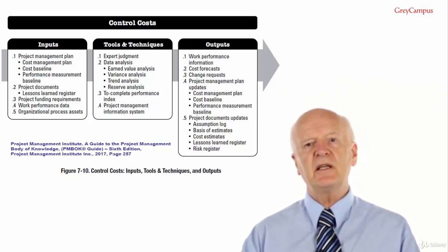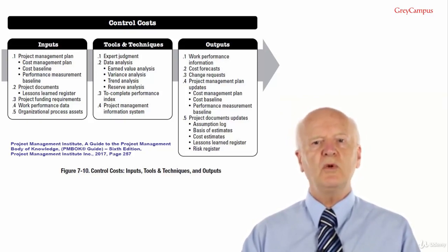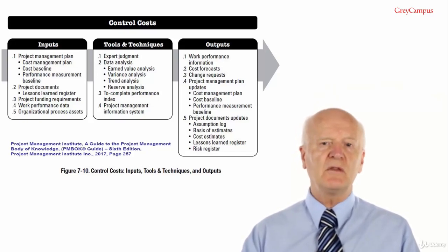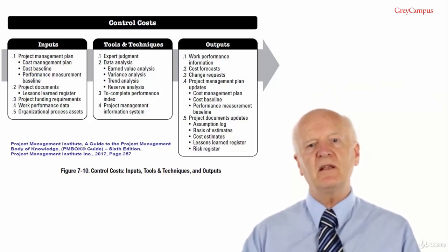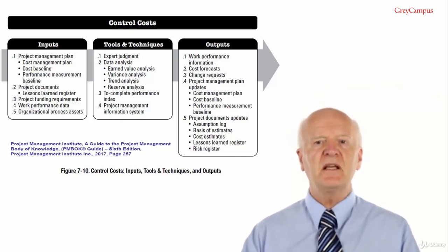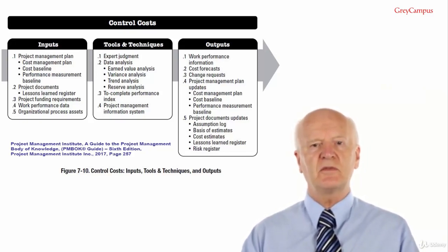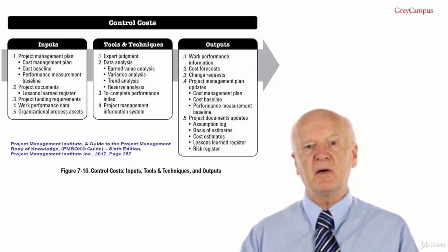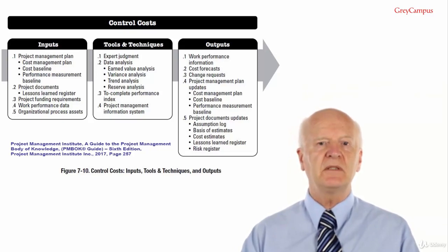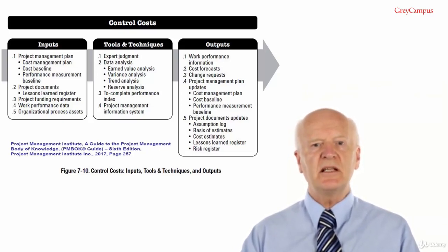At the end of a project, the schedule variance will always be 0. Please note that for the examination, because all of the planned value will have been spent and all of the earned value will have been earned, and so there can't be a variance. Cost variance is a measure of the cost performance of the project. It is the amount of budget deficit or surplus at a given point in time, expressed as the difference between earned value and actual cost.